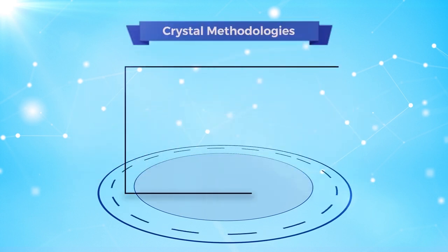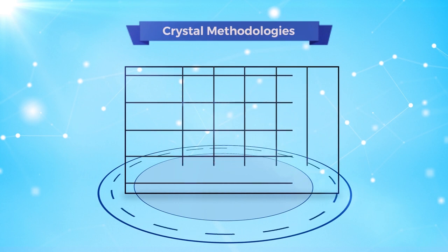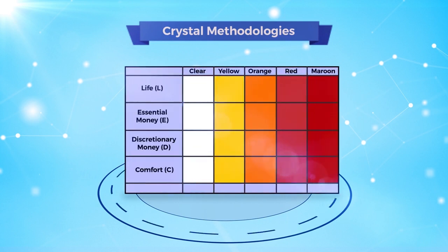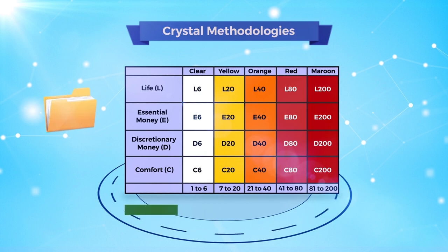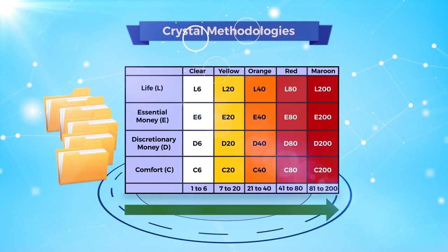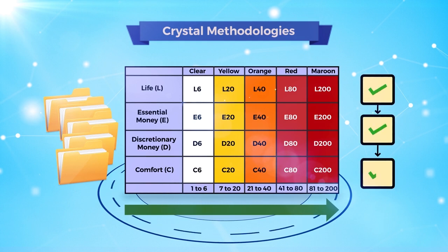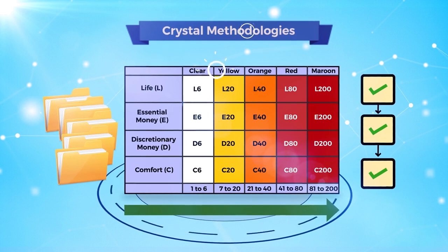Crystal methodologies are a family of Agile methodologies named after the colors of crystals of different hardness. The crystal methodology you should apply depends on the complexity or hardness of a specific software development project. As the size and criticality of the project increases, a methodology with more prescribed steps and artifacts is required to keep control of the development process.